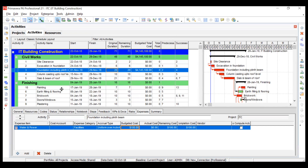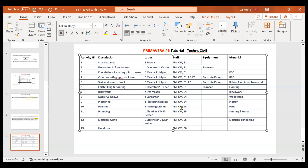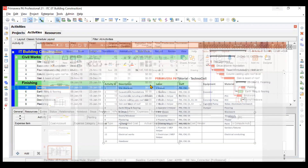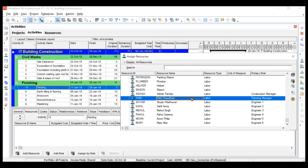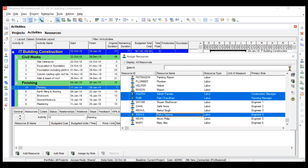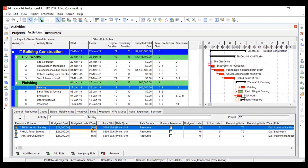We can also do this for the painting activity. Two painting masons are required, along with one PM, one CM, engineer 4, and paint material. We go to resources and add resource — PM, CM, and engineer number 4. For 7-day duration, budgeted units will be 70 — 7 days multiplied by 10 hours per day — and 70 multiplied by $300 is $21,000.